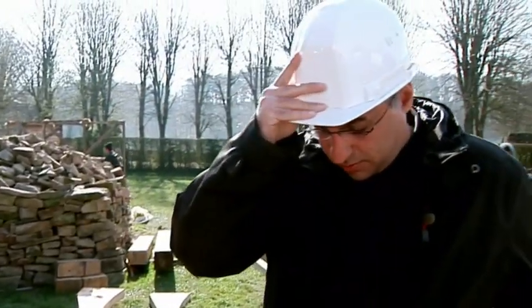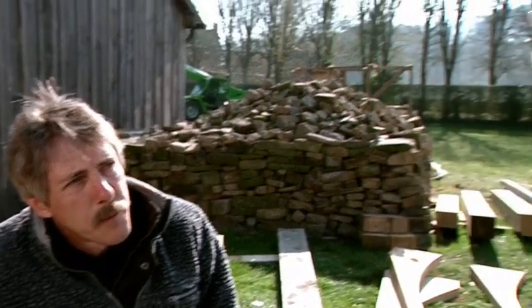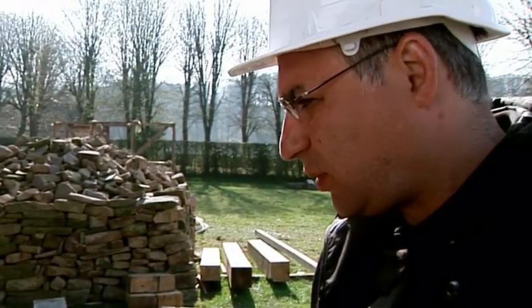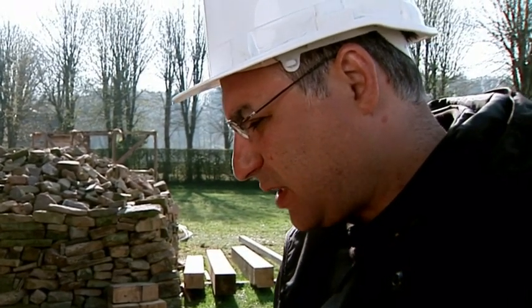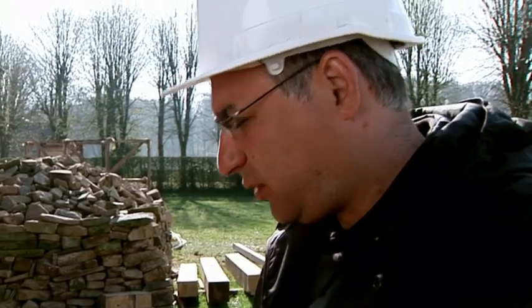With no time to come up with an alternative plan, Bashar has no option but to urge caution. What I'm proposing to do is have a very careful sequence of events that will gradually apply the load. So in case we see anything wrong happening to the crane, we can stop it there and then and try to address it.